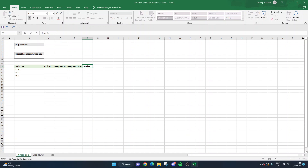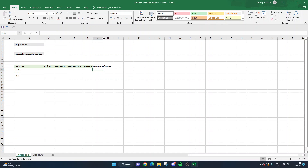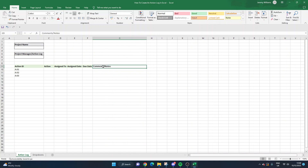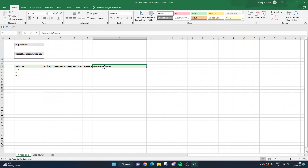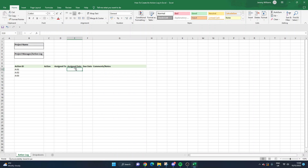We are going to put a Due Date because that can differ depending on the action. We're also going to put in a Comments or Notes column, and I'd suggest you bring this out in width because it just gives more text space. We're going to wrap this as well - what that does is if text goes beyond this line, it will drop below and expand without being blurry or pulling across to the other columns. At the end, I'd recommend three different columns: Priority, Status, and optionally a Percentage Complete.